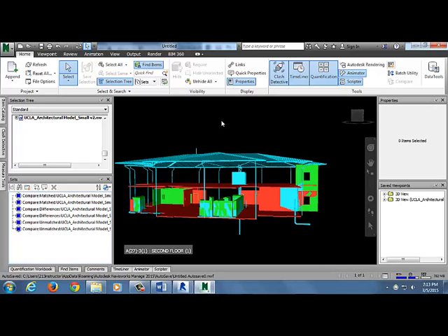Right, because it looks like it's going to be too much information if there's a lot of change between version 1 and version 2. Definitely. I think you kind of hit it on the head there. If there are so many changes, you might be better off just starting over your takeoff and redoing it.